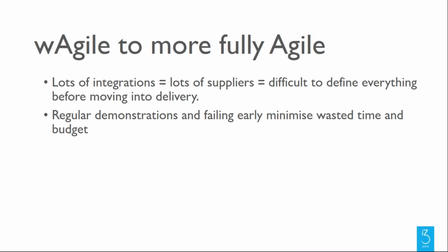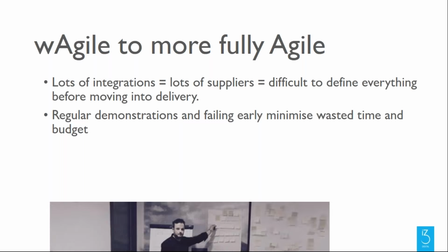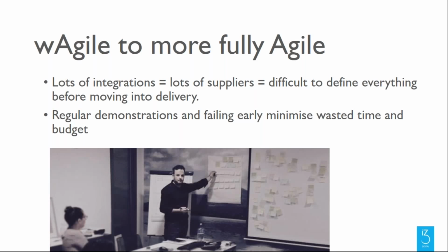The next thing that I think is important is that regular demonstrations in projects like this, which have got lots of integrations, help us to fail early, which is a good thing, which minimises wasted time and budget. So if you look at this here, we've got an example of one of the projects we were running internally last year. The post-it notes might look like just a good reason for putting bits of paper on a wall, but actually what they do is they make the project visual and transparent and allow us to look at things that aren't going well and therefore fix them.